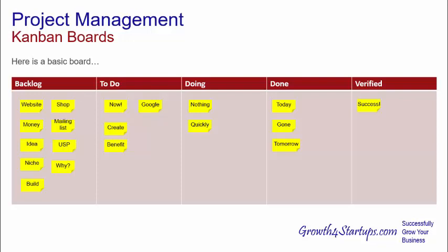If I'm working on my own, then clearly I don't need a doing column. But if I'm working as part of a team, then we will definitely have a doing column. Done and verified depends very much on the environment that I'm currently involved in working with. If it's a purely technical solution and it just needs to be proven to the customer, then done is probably sufficient, and we'll do the customer checking as a final stage at the end.